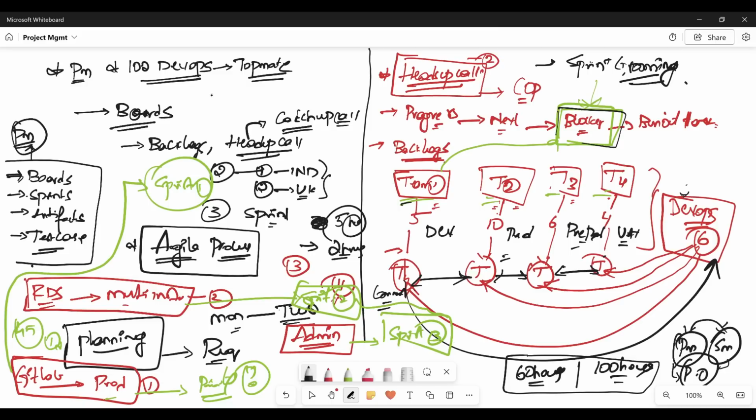For example, today sprint 3 is going on. Okay, when sprint 3 is going on, the client will come back and ask your platform owner, can you please do this work? And already we have enough work on our plate for sprint 3. So what we'll say is, for this sprint it is not possible, we want this to move to sprint 5. If it is priority, then we will move some of these sprint 3 activities to sprint 5 and we'll make this a priority, or we will ask additional engineers to work on the priority task first.